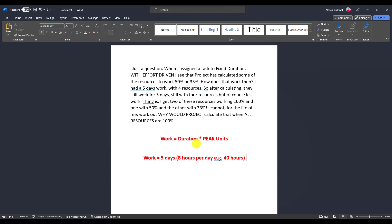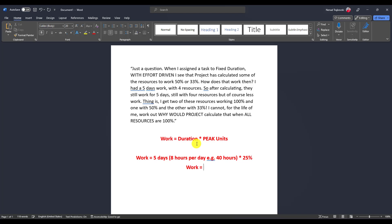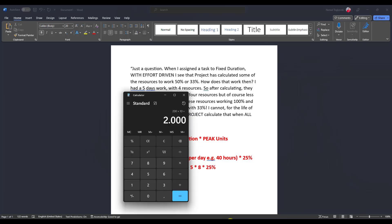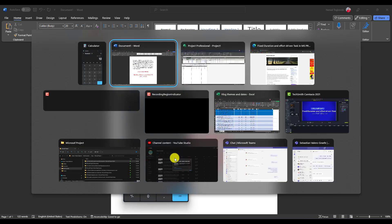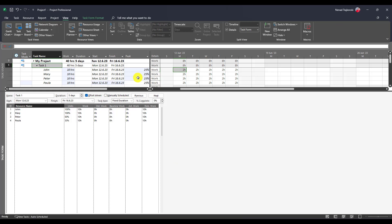Work is five days multiplied by 25%. Work is five days multiplied by eight hours multiplied by 25%. Let's go here. If you don't believe me, let's go here: five multiplied by eight is 40, multiplied by 25% is 10 hours. Exactly how much my resources are going to work.